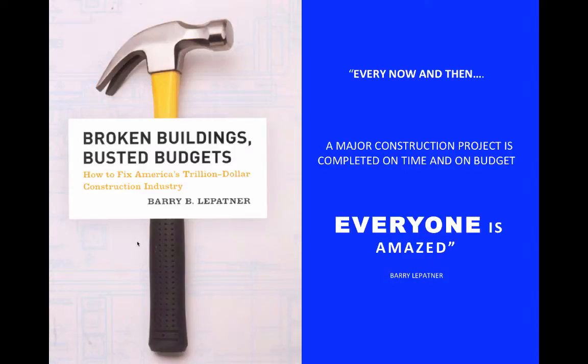Do you think that if these big public projects started out with a more reasonable number, it would be more likely that they would reach budget? Yes, absolutely. Because oftentimes, the point I'm trying to make, and the issue about cost management as opposed to cost control, is that the foundations are the decisions that you make around cost and schedule and procurement. Those three components, at the start.